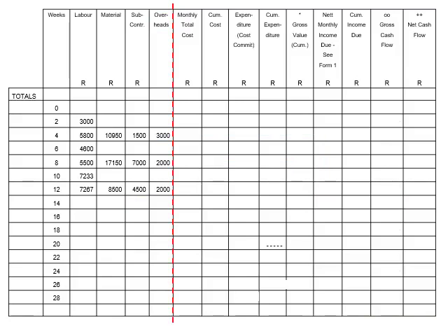The first column to be calculated, using the information recorded up to now, is the monthly total cost. The reason for doing the calculation monthly, is that financial reporting is usually performed on a monthly basis. It therefore follows that costing is usually also performed monthly, to coincide with all other financial reporting, such as financial statements received from suppliers, measuring and certifying work completed, etc.